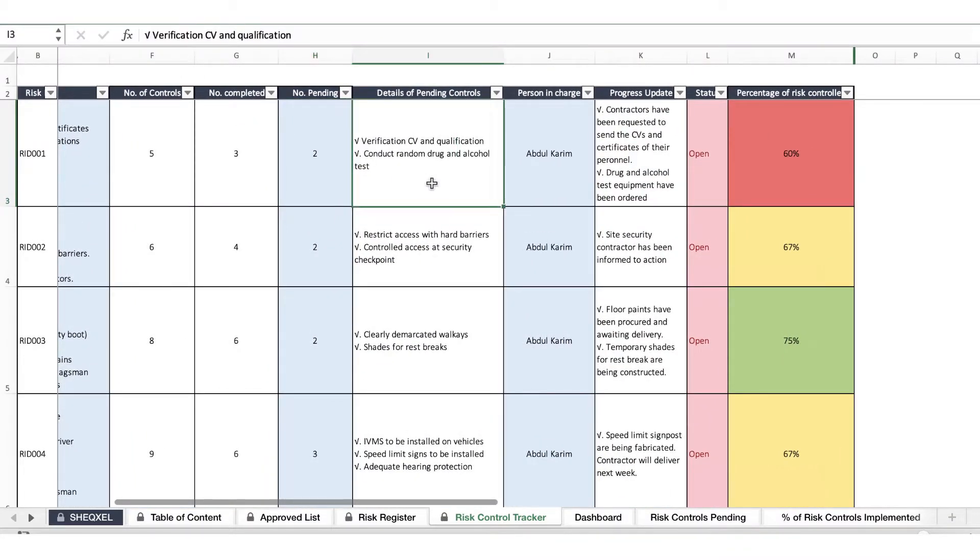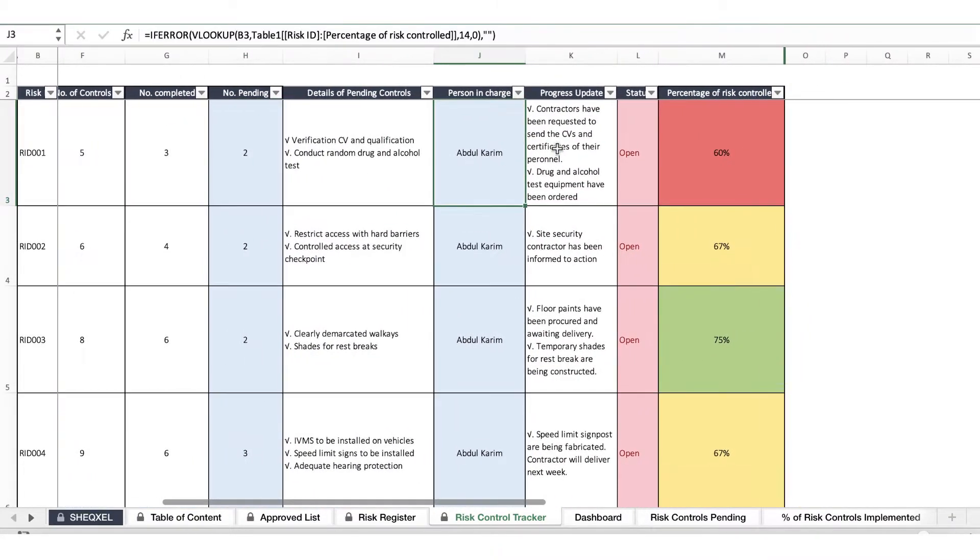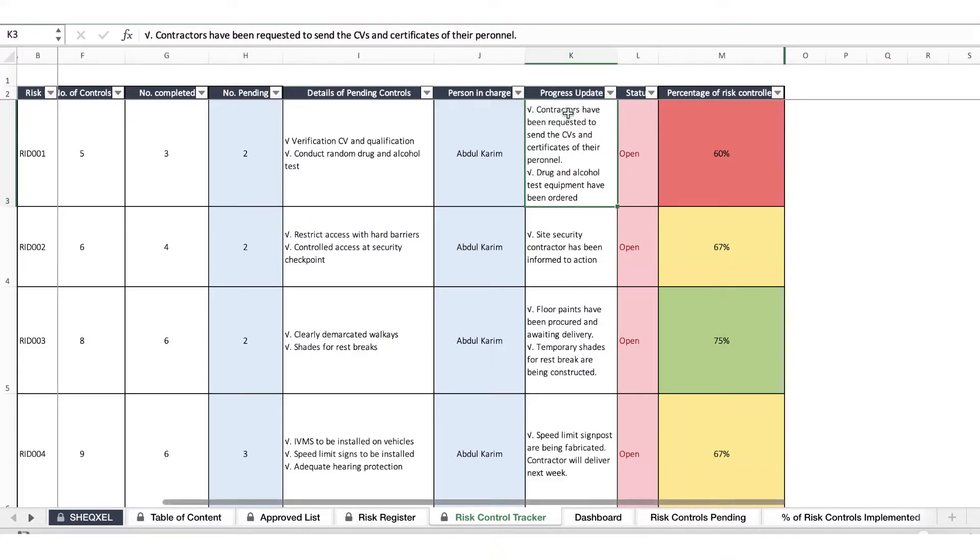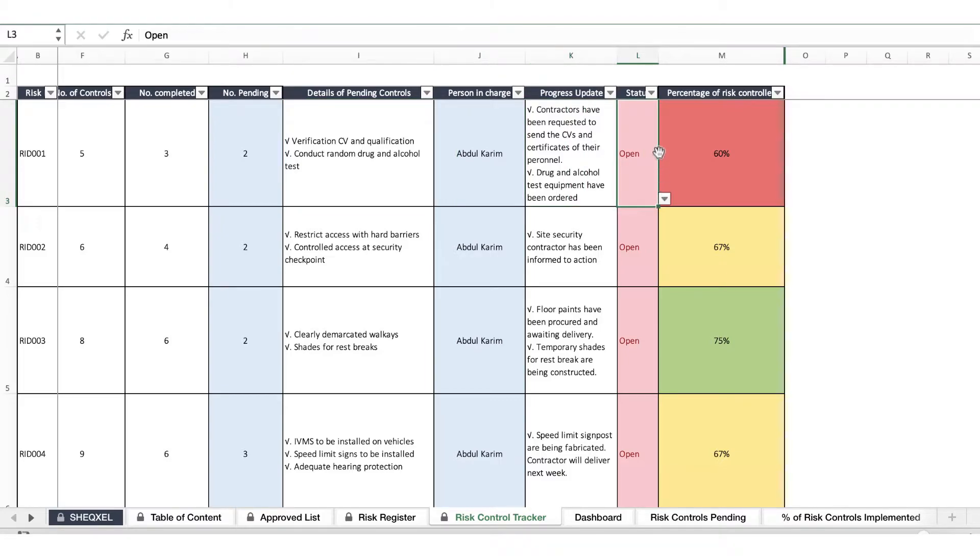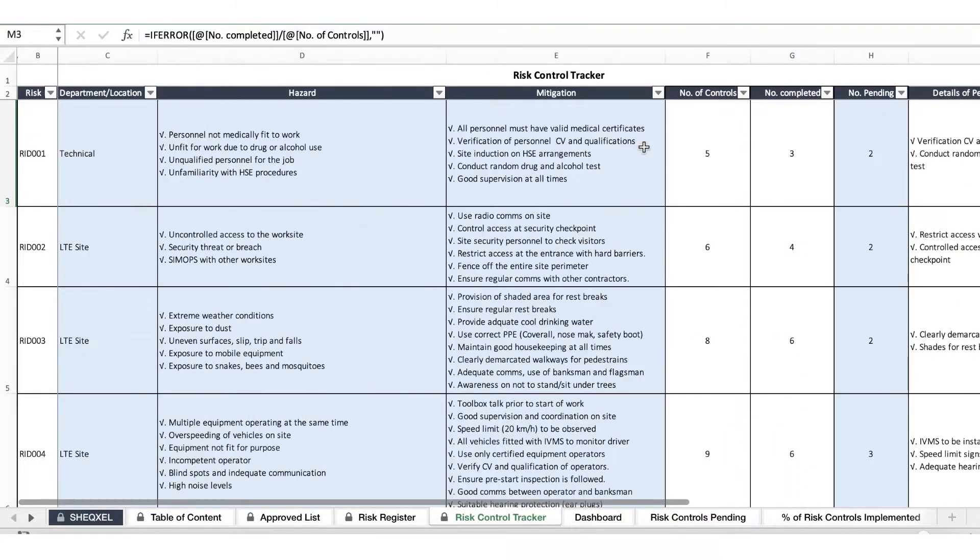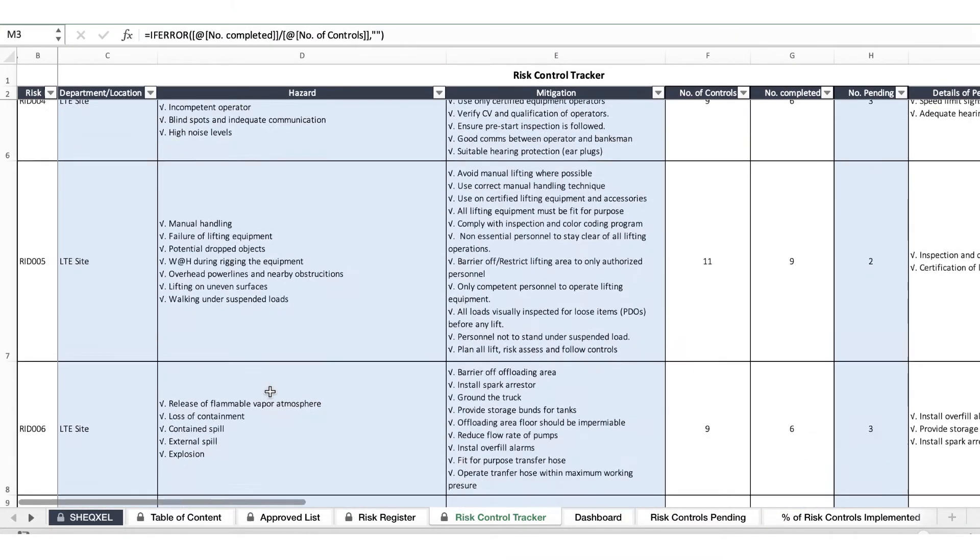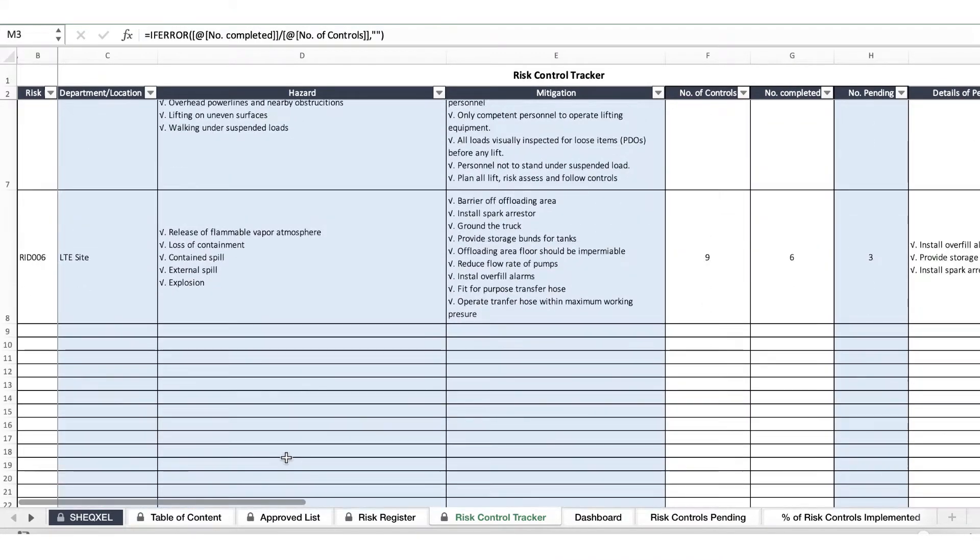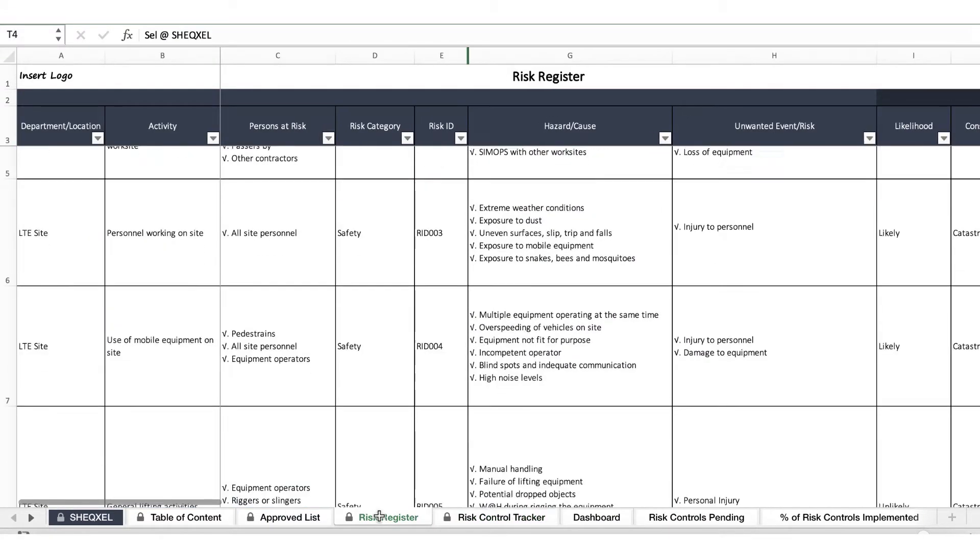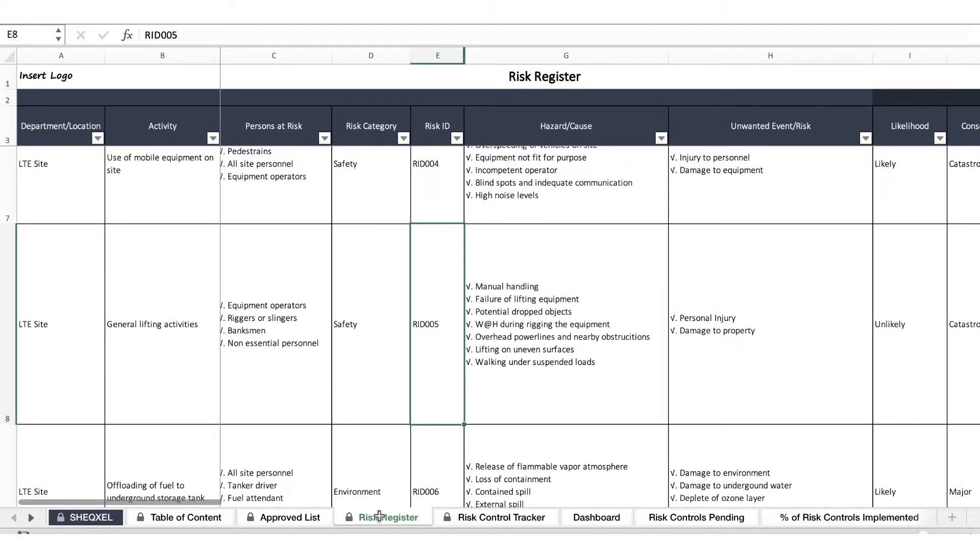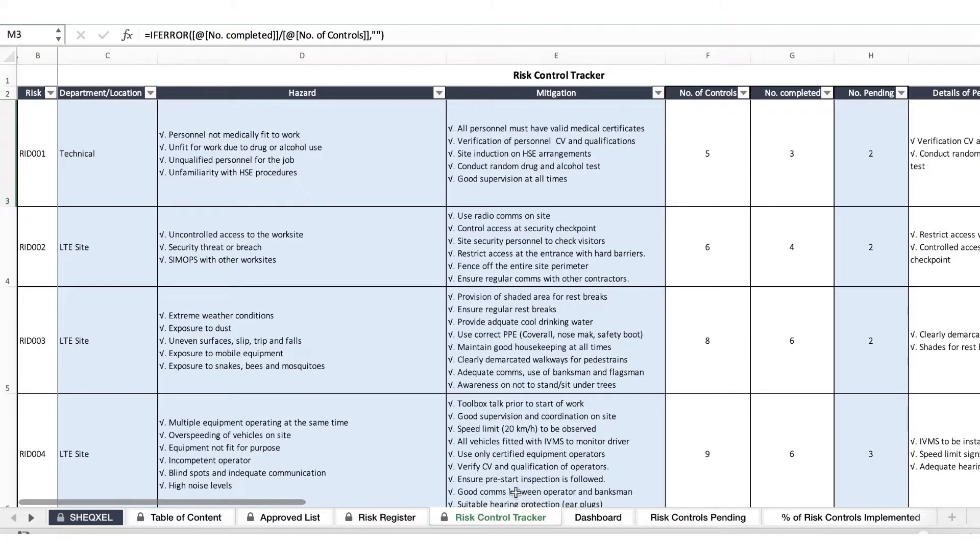You indicate the number of controls out of the list of controls and automatically know which controls are pending. Then the person responsible, so you engage the person to find out any progress update of these controls and you provide them here. The indicators are either open or close and automatically identify the level of percentage that have been completed. You can do this for all the risks that have been identified based on your risk assessment by indicating the risk ID.